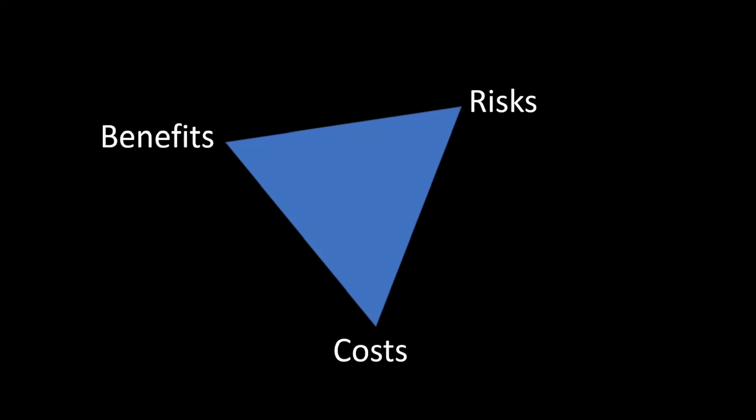The other consideration, of course, is the price tag. How much will this system cost to implement? How much to maintain year on year? And what about lost productivity during the changeover? Do we have to pay for staff training? Do we need new equipment and infrastructure? All of these things must be considered.